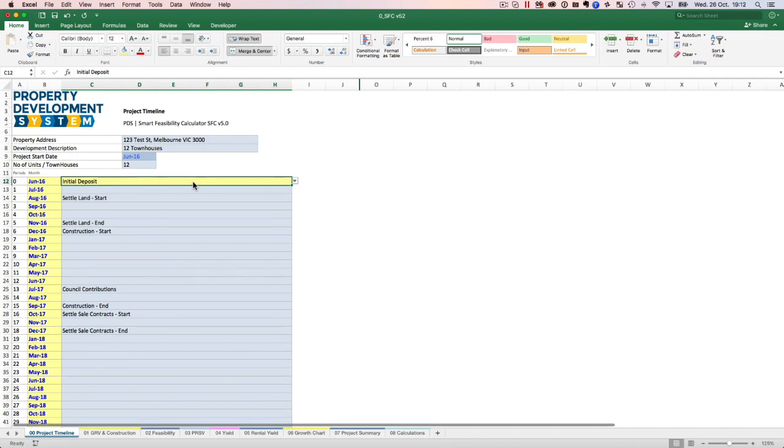So whatever money we get at 5% or 7% or 6%, depending upon what we've got it for, I have to allow for that interest cost in my feasibility, because then I allocate X amount of funds to X project. That is how you get the true profit margin or the true development margin for any project.